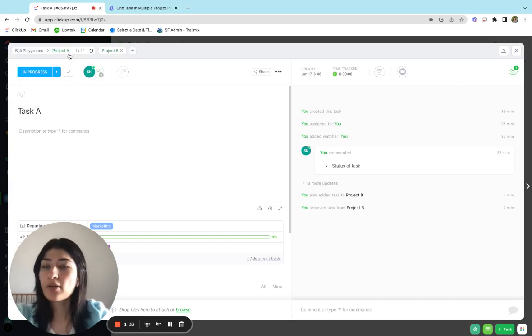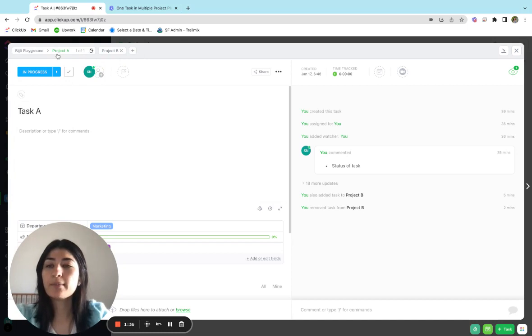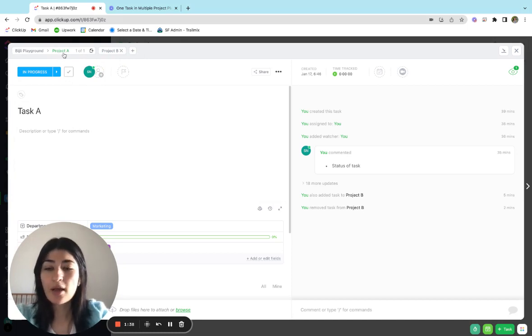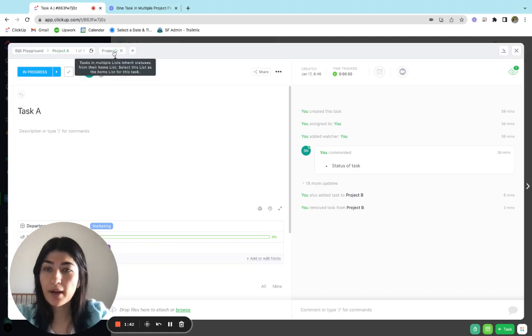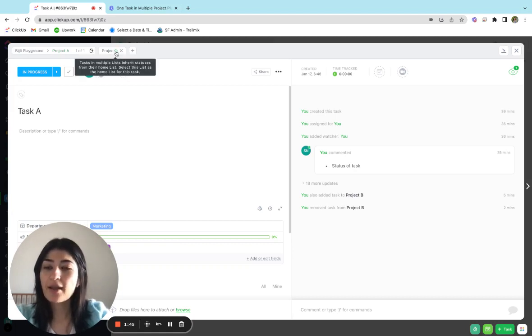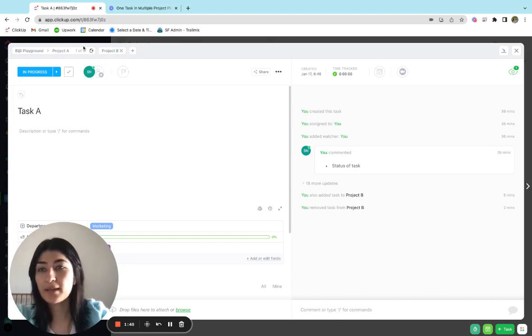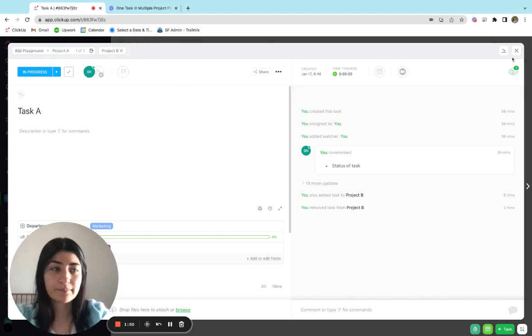Project A will always be the primary because it was created in project A, but I can always change that setting. If I want project B to be the primary, I have this little home icon. I can click this and it will then become primarily in project B and project A will be the secondary.